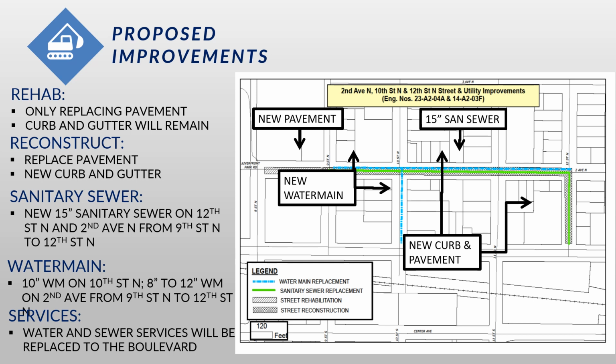On this project, both pavement rehab and reconstruction are going to be required due to the extensive excavation needed to install the utilities within the right-of-way. And on 10th Street, where we're going to be doing a water main replacement, we will use trenchless installation where possible, and there'll be minor patching and then a bituminous overlay where the street repairs are required.